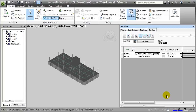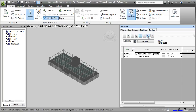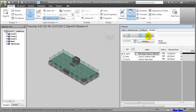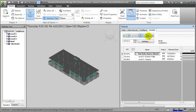After the 4D simulation has been completed, we can step through it a day at a time to take a closer look at the construction activities. We can click the Step Forward button and move forward one day at a time, watching the joists appear and the joists being completed — and right there we have a bit of a problem. What's happening is the exterior walls are coming in as one large component. The core of the walls, the interior surface, and the exterior surface are currently one building model element, so when they appear in the model, all those layers appear at the same time. This isn't strictly accurate — typically we'd build the core of the wall first, then later add the exterior surface, and finally after the building is weathered tight, we'd add the interior surface.